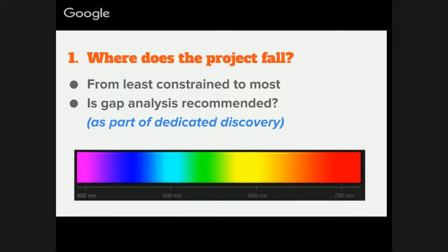The client's just learning, oh, you need a copywriter for a website? Yeah. Or you have a major institution that has a 10,000 page inventory, and is it a simple migration, or will there be actual content work happening as well? Oh, well, now that we think about it, there probably will be content work. Okay, same exact response: you need a content person. $1,000 project, $100,000 project, same problem. So that's an important thing to understand, that the risk on a bigger project is kind of linearly or non-linearly related to